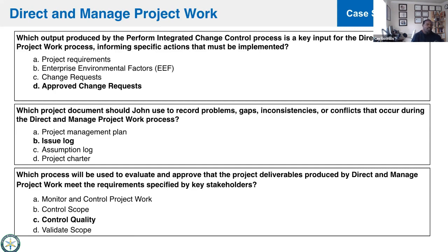If we're talking specifically about the exam, PMI language, we develop metrics during plan quality. However, for KPIs, PMI makes no mention of when we capture those. In fact, PMI will refer to KPIs when we see project closure and when we create the final project report. That's where you see the word KPIs come up. Sometimes you'll see it. You don't even really see it in a charter, which is where it should be, because then at the end of the project, that's where we should start and it should kind of come from.